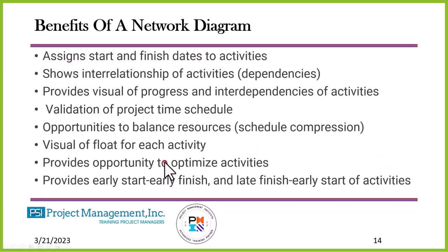What are the benefits of a network diagram? I know everybody here probably uses Gantt chart formats. I'm sure you do. And probably most of you have never done a network diagram other than in the classes that you've taken. Do we need to do a network diagram? First of all, it's going to assign the start and finish date to each activity. It shows the interrelationships of the activities, the dependencies of the activities. It gives us a great visual of progress and interdependencies of activities.